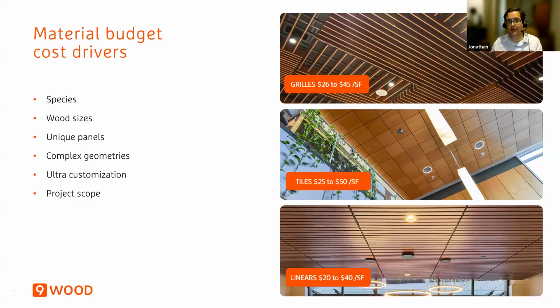So if you stick with the manufacturer's standard species, those are generally going to be much more budget friendly. Doesn't mean the other can't be supplied, but there's the cost trade-off, budget impact. And oftentimes in a ceiling, you can actually deliver looks with the more exotic, with some of the standard species of those custom stain matches also.